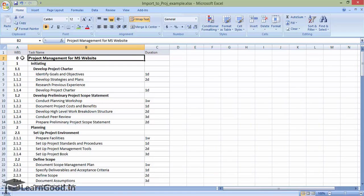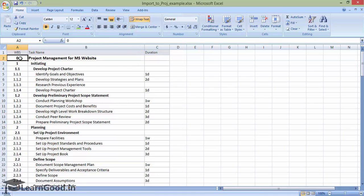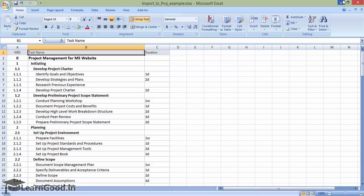You will see in a short while that it is a good practice to have the headers. When you ask your team members to compile their own work breakdown or work estimates, it is a good practice to use a standard template like this and ask them to fill it up. That way, when you are compiling from multiple sources, you will be saved a lot of trouble.